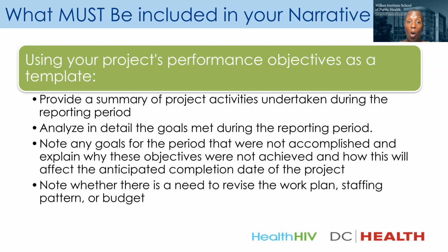Those could very well also be reasons that your activities may not have been met, as a result of perhaps getting grant funding 4 months after it was awarded, and you were unable to get your focus population where they needed to be in terms of your work plan, which means that you had to revise your work plan and start 4 months later than what was initially proposed. So all of those things, when you are documenting your work, your program in general, you should have at your fingertips.